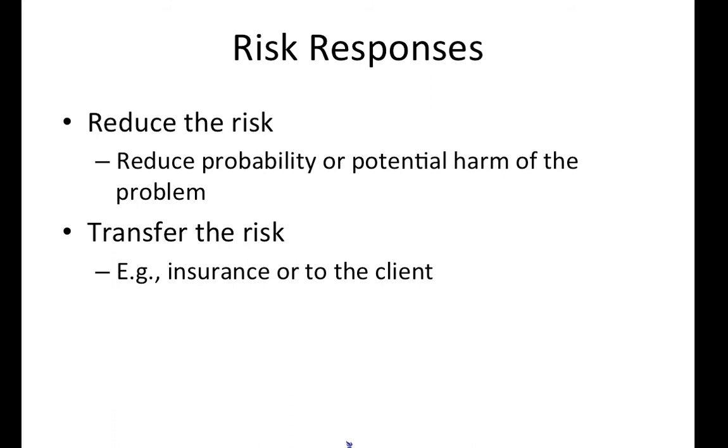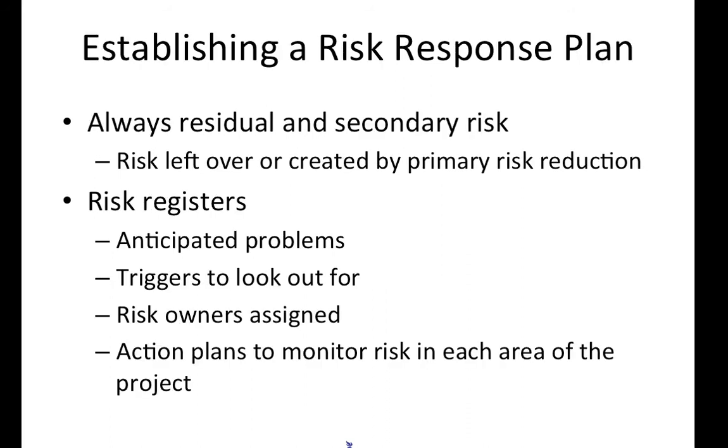Reducing the probability of the risk usually calls for looking at a potential source of the risk or problem. Once identified, those sources are addressed in advance. Developing contingency plans is one approach to minimizing potential harm. If the problem does not emerge, for example, more resources may be mobilized to minimize its negative impact. Even when we handle risk, how we do so creates risk of its own, which is sometimes called secondary risks. It's good then to have a risk plan moving forward.